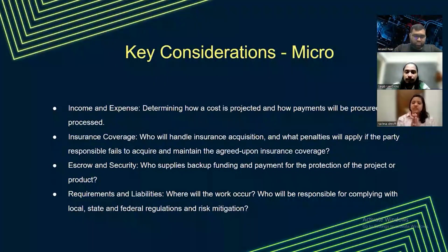Insurance coverage is not a part of all the agreements. It happens with very, very big companies. It covers who will handle the insurance acquisition, and what penalties will apply if the parties responsible fail to acquire and maintain the agreed upon insurance coverage. I have till date not seen an insurance coverage.